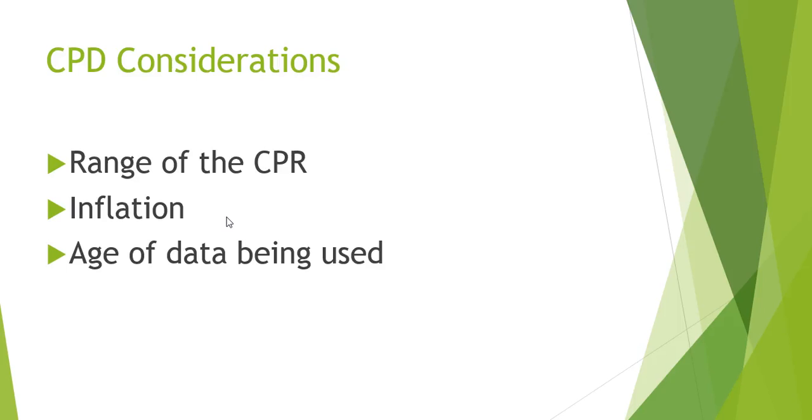Also, the age of data that you use in the calculations can affect the answers. Simply that over time, again, equipment changes, processes change, values due to other reasons besides inflation change, and if you use old data, again, it might not reflect the future, and it'll make your ratio be out of whack.